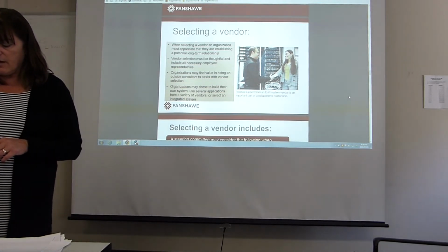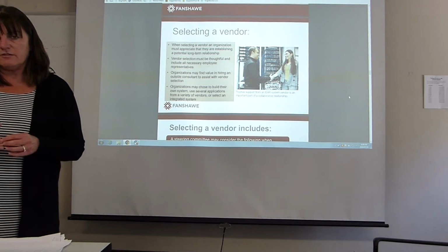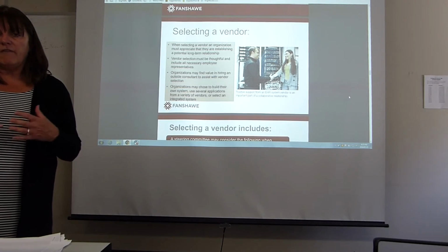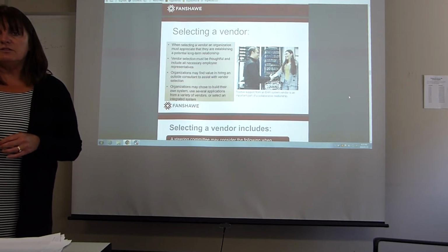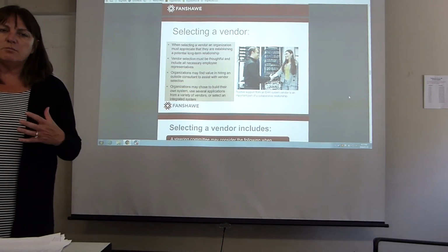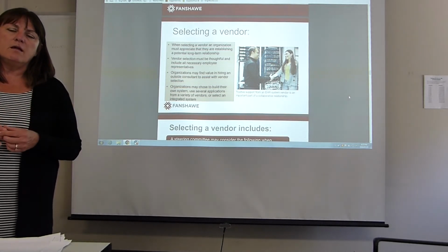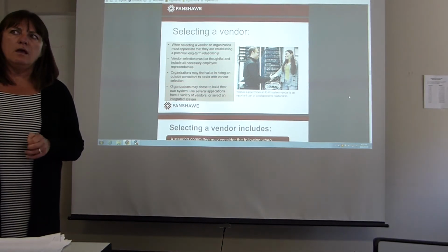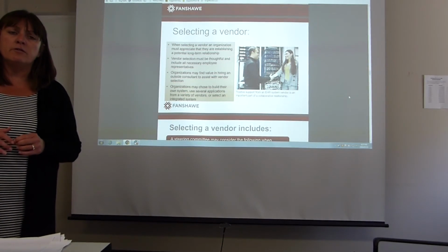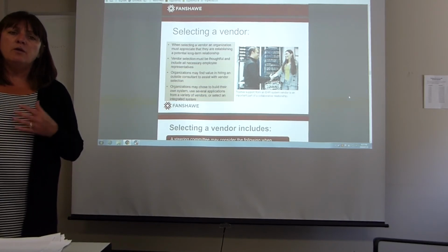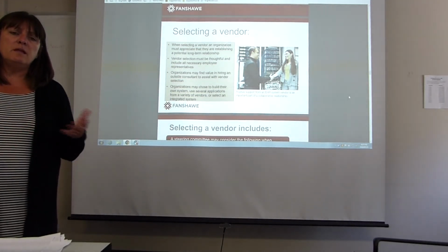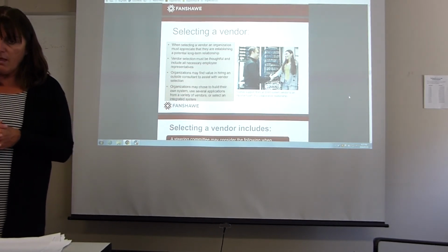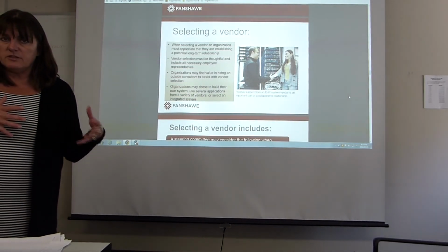Organizations may find value in hiring an outside consultant to assist with the vendor selection, again for that objectivity. And we may not have the resources internally to do the vendor selection and to manage that as a project, and so quite often you can outsource that. Locally, when we implemented the computer provider order entry system 4 years ago, we used Deloitte, a company we used to assist us with the project management as an outside project manager.